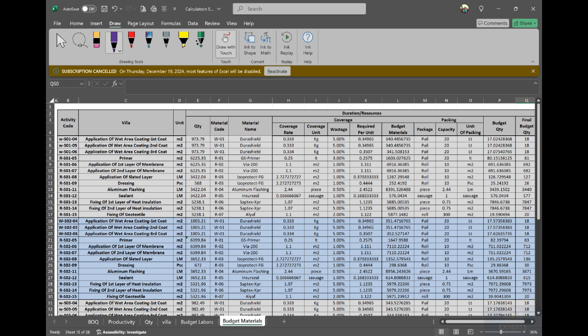for the activities itself. Then we can start building our activity list, and we understand how we can divide the project into WBS. And after that, we understand how to build this sheet, okay, which is based on all the data which we collect from all the departments, such as procurement or quality, and from this sheet we can calculate the budget labors, budget materials, and budget equipment.